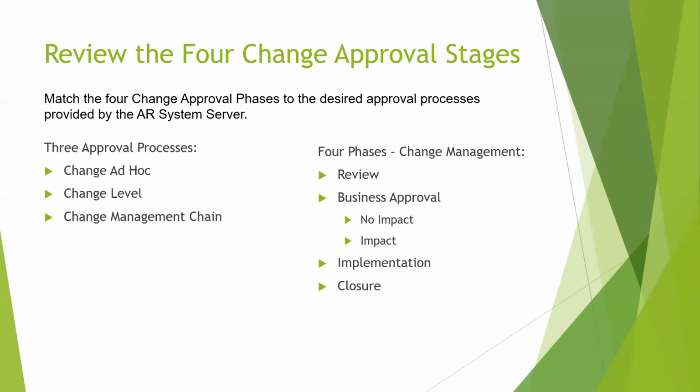So I tried to get them to let me put it into the mapping instead of them doing ad hocs as much as possible. If that doesn't work, email them the change. Ask them to look at the change and give you their feedback, if you don't need a signature but you need to have them look at it. But if you absolutely have to do the ad hoc, make sure you're aware of it.